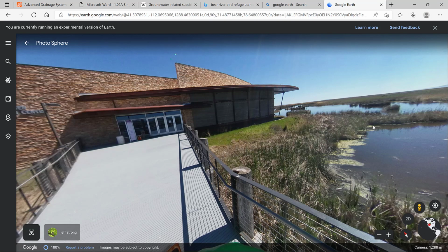And about a couple days after we turned the dewatering system on, we came back, and there was like a mini geyser in the basement around that sprinkler pipe. There was a lot of water, and I'm talking like a little geyser shooting up about, I don't know, 8 inches. I don't think that's an exaggeration at all. It was an 8-inch geyser, and the basement was just flooding galore. We were trying to switch over to the permanent system, but there was just so much water coming in through that fire sprinkler.